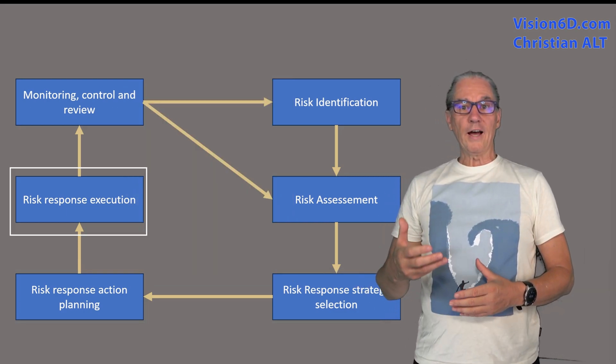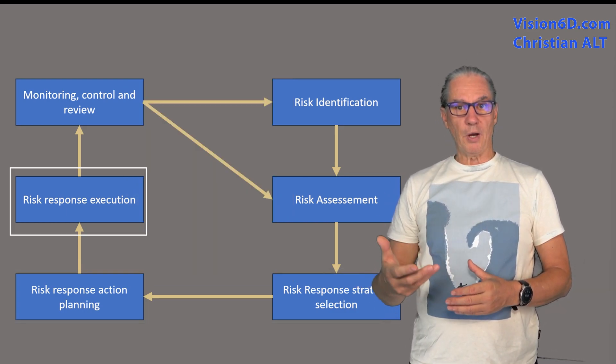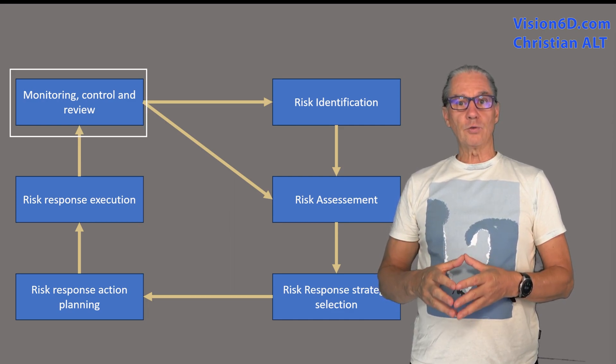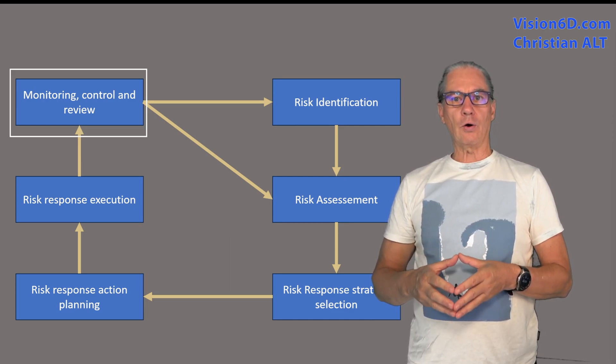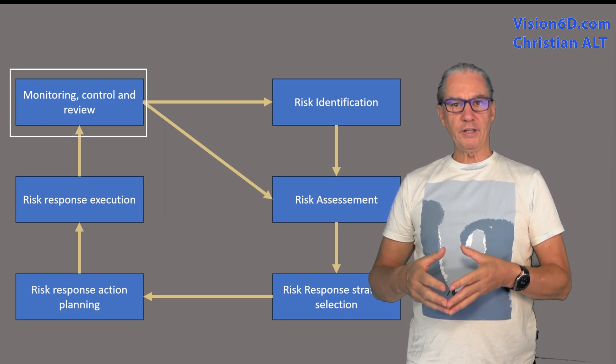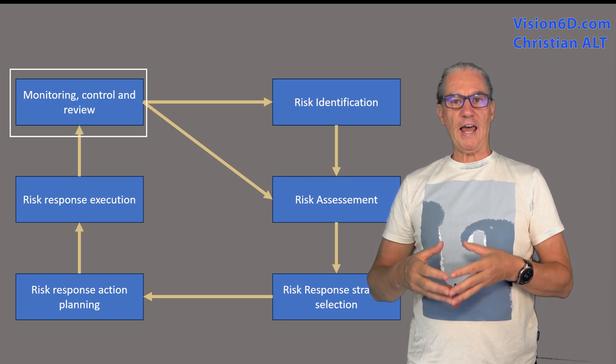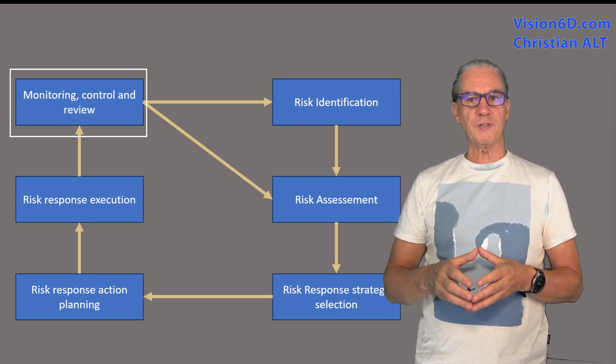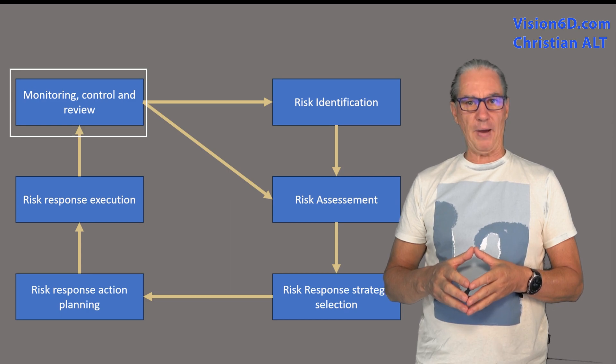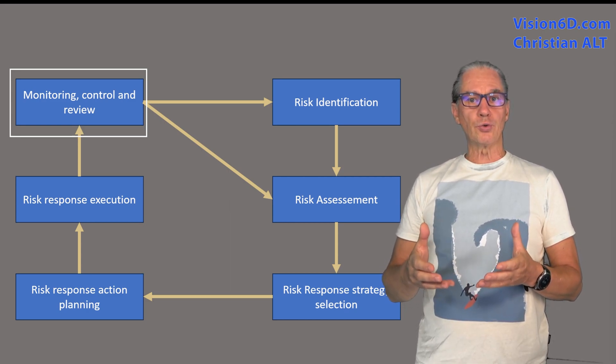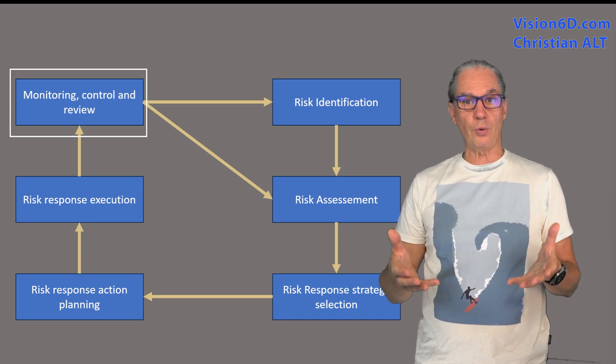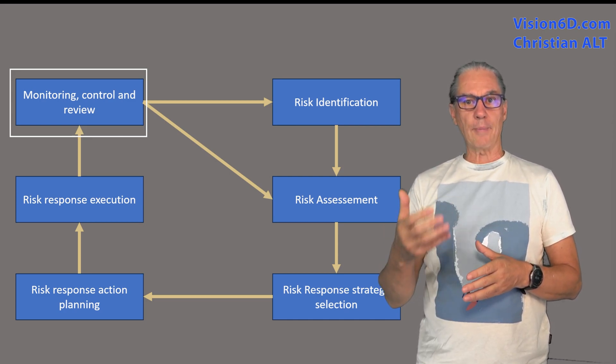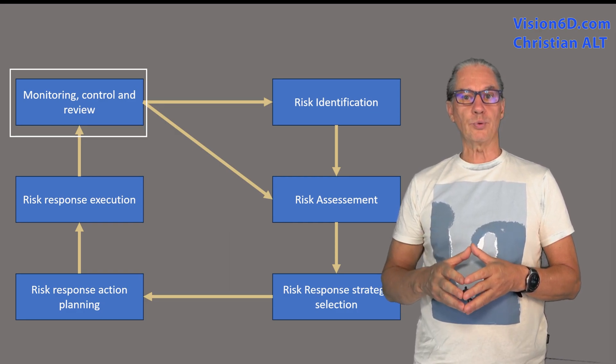We are now going to execute the risk response and after that we will monitor and follow our measures. Regularly through all the project life cycle, we are going to review for each risk and assess its impact and consequences in order to see whether our measures or controls of the risk were appropriate or needs to be improved.